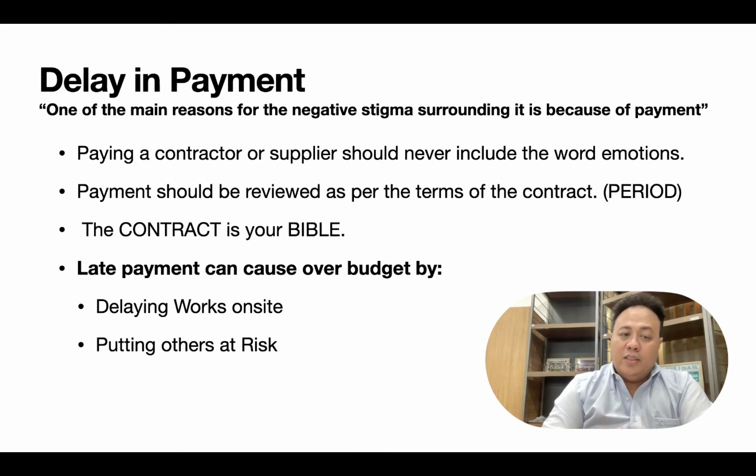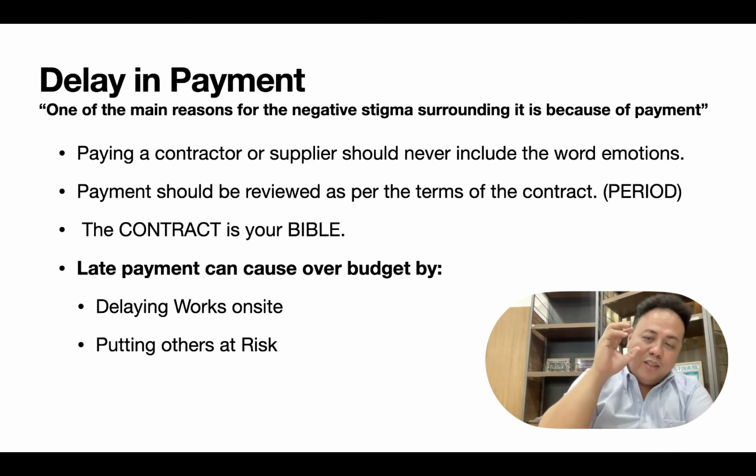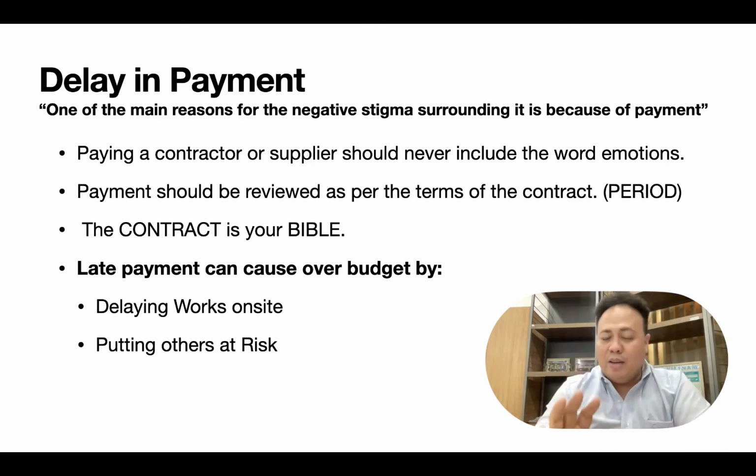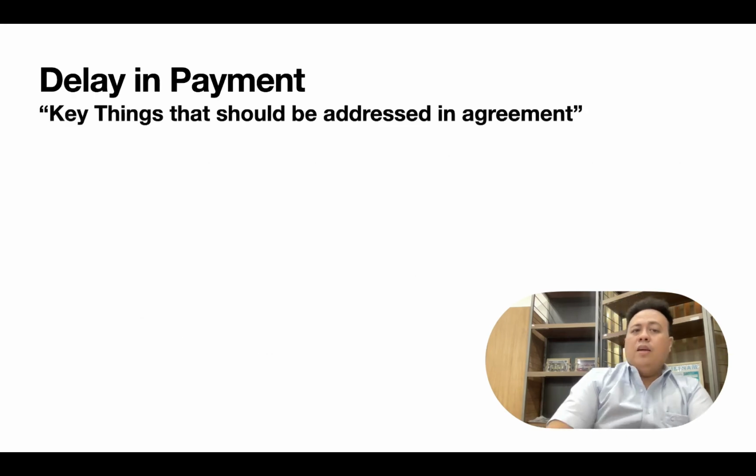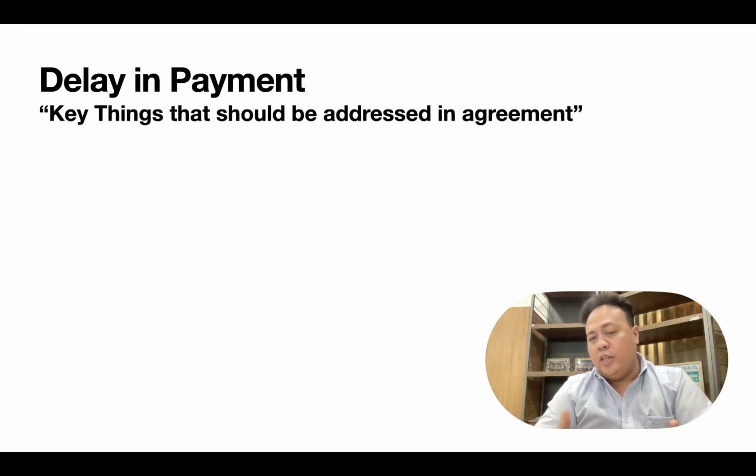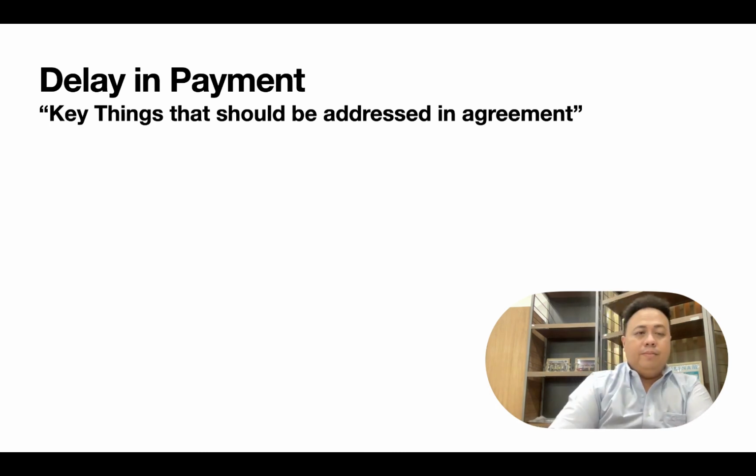So the next, you're putting others at risk. If you don't pay the main contractor, the supplier cannot pay the subcontractor, the subcontractor cannot pay the workers. So everyone is affected, and it will cause a big issue on your job site. So, delay in payment.